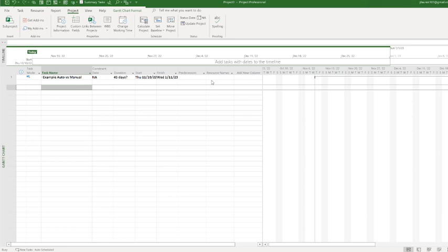But the standard is always from project start date, because there's a little bit of hope that you're already planning before you even start executing. And then, of course, there's a status date right here, which we're not going to do quite yet, because status date sets the date of how much of the tasks you need a status up to. So if I set a status date of today and I don't have any tasks, well, that just doesn't make sense, because what are you statusing?